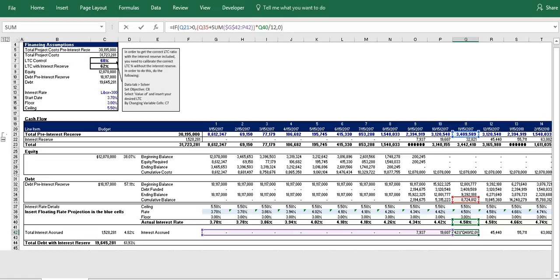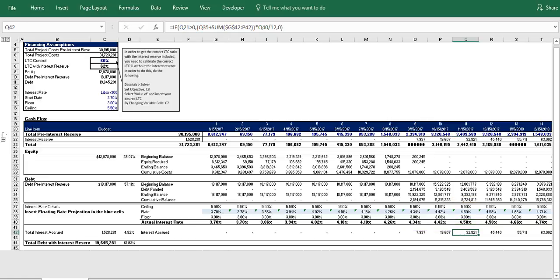So it's the norm for construction loans to have a floating rate debt pegged to either LIBOR or the prime rate or ten-year Treasury. And it's also fairly common to see both a floor and a ceiling to these interest rates. And so briefly, the floor is basically the minimum interest that will be charged on the loan regardless of if the index moves to like an extremely low rate, and the ceiling is the maximum interest rate to be charged regardless of where the index moves.